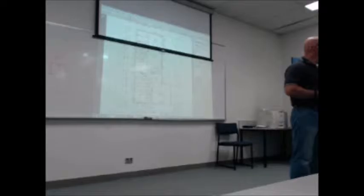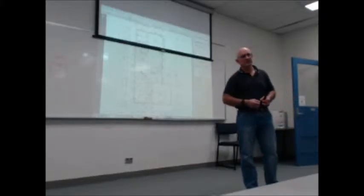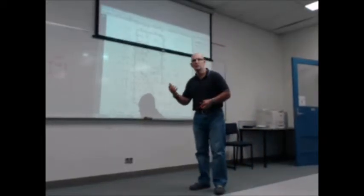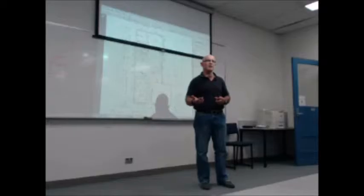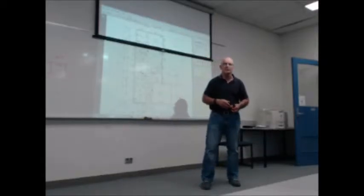Danny, what happens if there's a problem when you want to move in? Well, it's a letter between the builder and the client for an item to be attended to, as long as it's not in wet areas. Yeah, you're accepting practical completion with the proviso that this is actioned. Okay? And then you've got something to go at a later date, if it doesn't get actioned. And it's the Catch-22 of getting in: you've got to get out of your rental or wherever, the house that you own, you've got to move out, you've got to move somewhere. Do you hold money back? Probably not, but it doesn't happen except that.